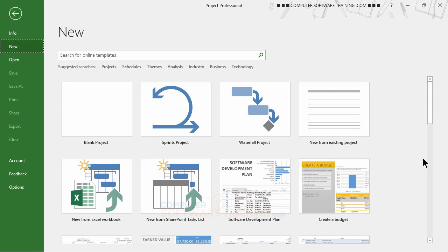By doing this, we're going to be able to share resources amongst the different project files, and we're going to know if we've used a particular resource in a particular file and thus go for a different resource, right? Okay, so the first thing we're going to do is put together the resource pool, and I'll open that up for us so we can see that.